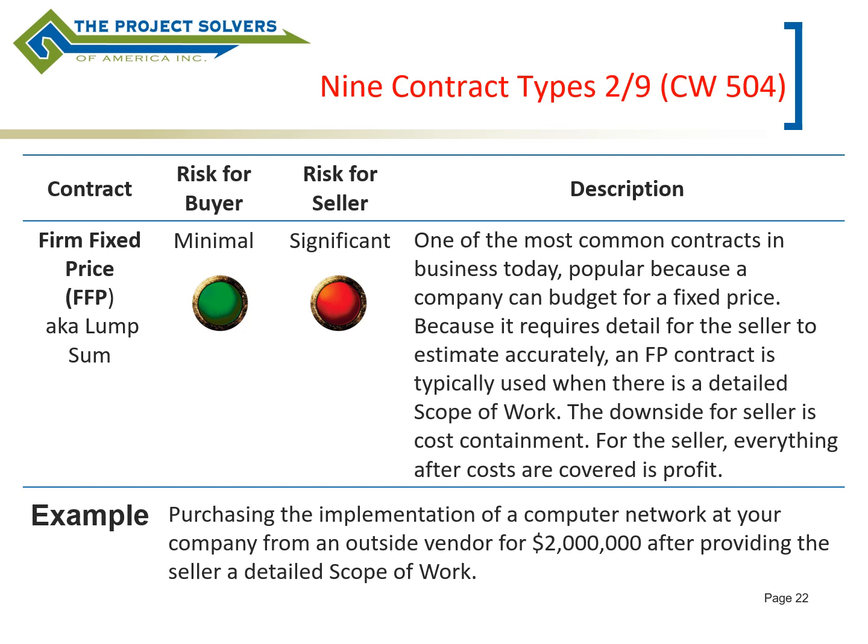Okay, so the next is firm fixed price, and if you remember from that graph previously, the significant amount of risk is for the seller and really hardly any for the buyer. And that's because the buyer knows how much it's going to cost up front and how much they have to outlay. There's no surprises at the end.